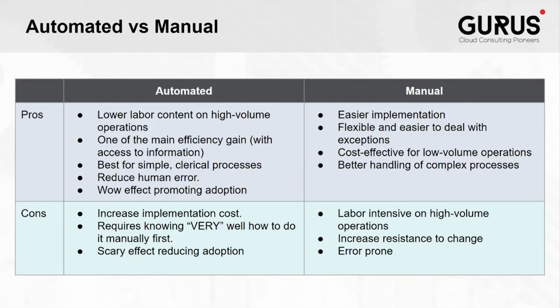This is why at Gurus we evaluate the processes that are worth automating, partially or even completely for the first phase during project planning, and even throughout the implementation as the project progresses. Although this may mean more mouse clicks on day one, we have many ways of preventing user error in NetSuite, even when conducting manual business processes. For instance, by making fields mandatory or rejecting certain inputs when invalid. By combining some level of control and by maintaining many user-driven processes, we're able to reduce the cost of implementation and allow for better handling of complex processes. This eases the effort of the implementation in general and allows us to automate thereafter once the system is live.